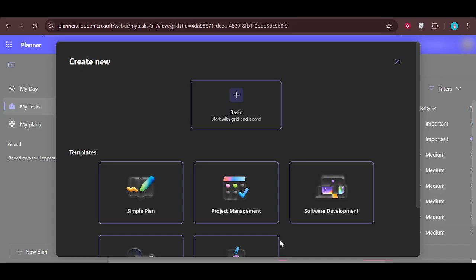So to recap the core workflow, open Microsoft Project on the web or Planner in Teams, start a new plan or project, and select the option to import from Project Desktop. From there, you'll either upload a standard .mpp file or, in organizations that have gone a step further, use a Power Apps-based process to bring in XML data.